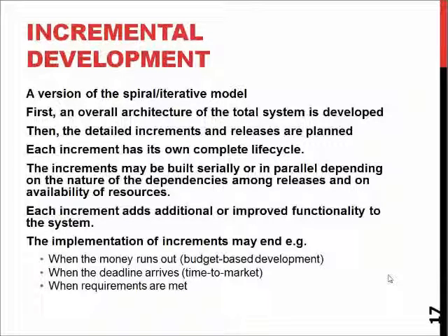And one thing that usually is done is the incremental development. It means that you start your first project by doing the core system, and then create additions or add new features or add new content packs or DLC or whatever by doing incremental work, adding new stuff into the existing product.